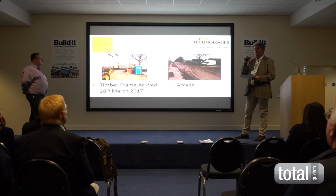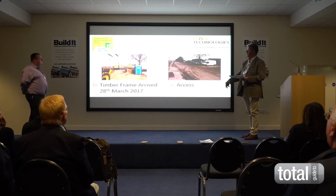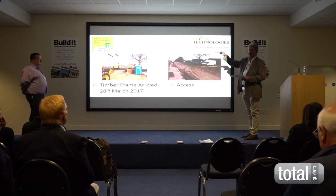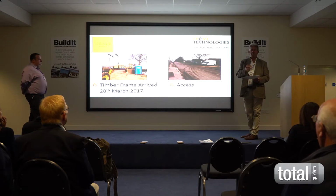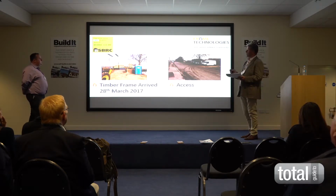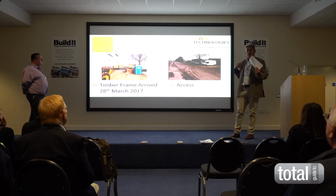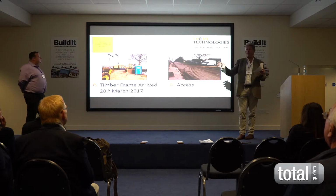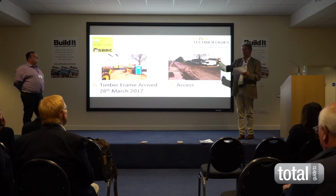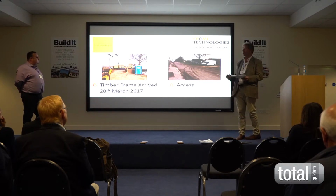They are coming in, but again, from a logistical point of view, timber frame came in at 8 o'clock. By 10 o'clock, the floor came in. By 12 o'clock, we had steelwork delivered. And again, that's the thing with off-site, going back to what we were saying earlier about putting it into a package where we had complete control of it. We were organising the whole thing. We had control of that programme, so we weren't waiting for Martin to have organised this or that. We were dealing with the whole programme.